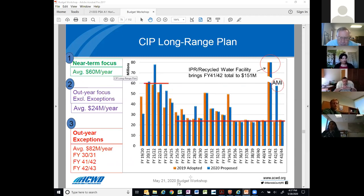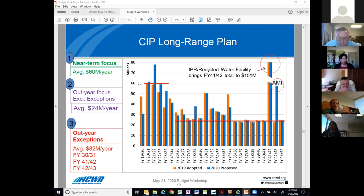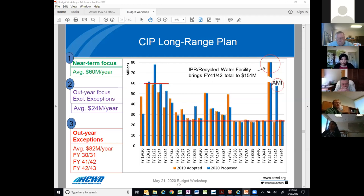Here is a chart showing the 25-year plan. The key takeaways: in the near-term, for the next three years we are looking at $60 million per year on average. Then in the out years, our average investment will shift back to our normal level of $24 million per year. We do have some exceptions: one in year 30-31 is because of a placeholder project related to Mission San Jose water treatment plant improvements. In year 41-42, there is another placeholder project for water reclamation phase one, bringing that year's estimate to $151 million. For 42-43, we have added a new AMI replacement project, considering that the financial life cycle of AMI is 20 years, so we added a placeholder to capture future replacements.